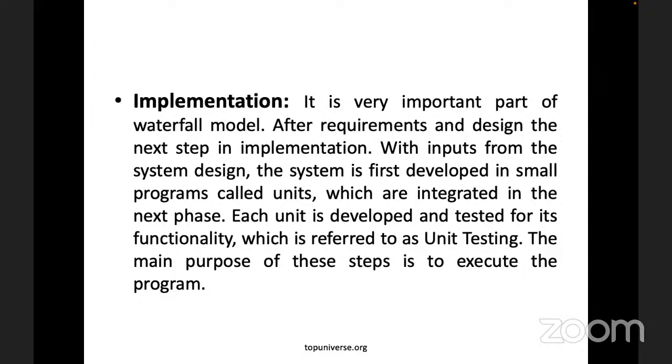And also, we probably carry out some light testing and implementation as well. Also, if significant changes are required during this stage, sometimes you may have to go back to the design phase and start tweaking the whole design process again. Okay, you go back to the design phase and try to work things out again before you come back. So there is a little back and forth at that point.